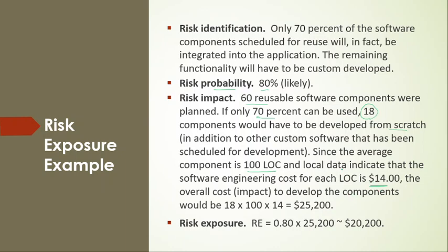The overall cost impact to develop the components would then be 18 into 100 into 14, that is equal to $25,200.